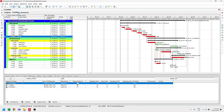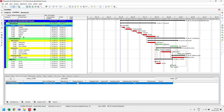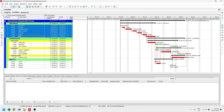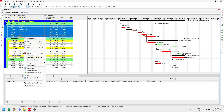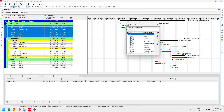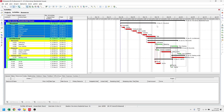Let's select all structural activities. Let's right-click, then select assign resources. Now choose the material resource we created earlier. After that, we refer to the BOQ for the cost of each activity.